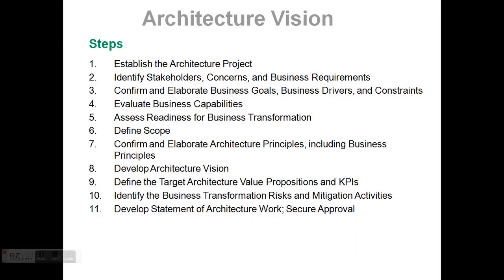Step 5 is talking about assessing the readiness of the business transformation. So how ready this business is to be transformed. Basically, a business transformation readiness assessment can be used to evaluate and quantify the organization's readiness to undergo these changes. This assessment is based upon the determination and analysis of a series of readiness factors.